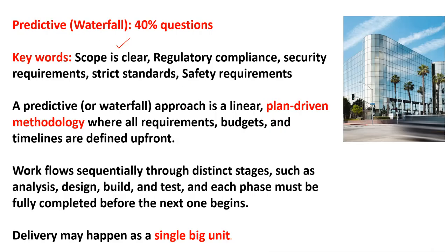A predictive or waterfall approach is linear. It is a plan-driven methodology. Here I have made a simple example for you. Suppose you have to make this building. In advance, upfront, you should know how many floors this building should have. Suppose I say there should be 10 floors, the first floor should be for offices, there should be a swimming pool, and there should be 50 or 100 parking spots. Everything should be planned in the beginning.